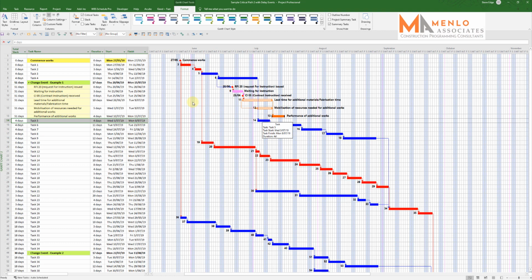The other example would be, say, where you've got the same soft spot, but this time you're in the middle of cutting foundations, and the foundation work would have to stop until you fix the soft spot before the foundation works could carry on. So it literally would split the tasks. And we'll look at that in this example here, just to show how the two impact things.